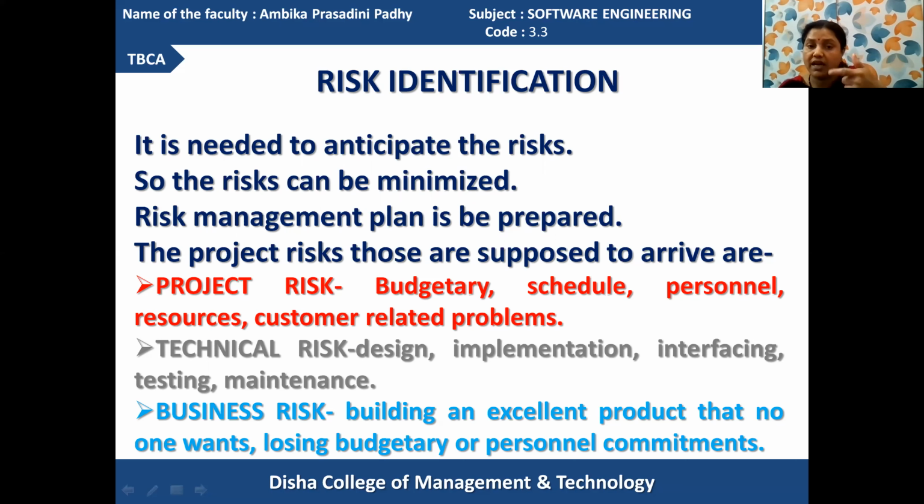The types of risk can be budgetary failure, schedule failure, personnel requirements, which means manpower requirements, resource requirements, and customer related problems. Those also can include design requirements, implementation, interfacing actions to be performed, and testing and maintenance actions, which may lead to certain technical risk.